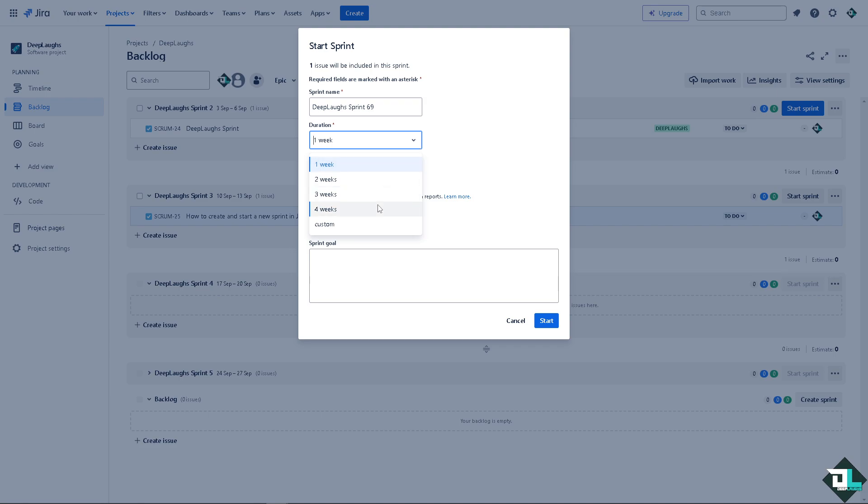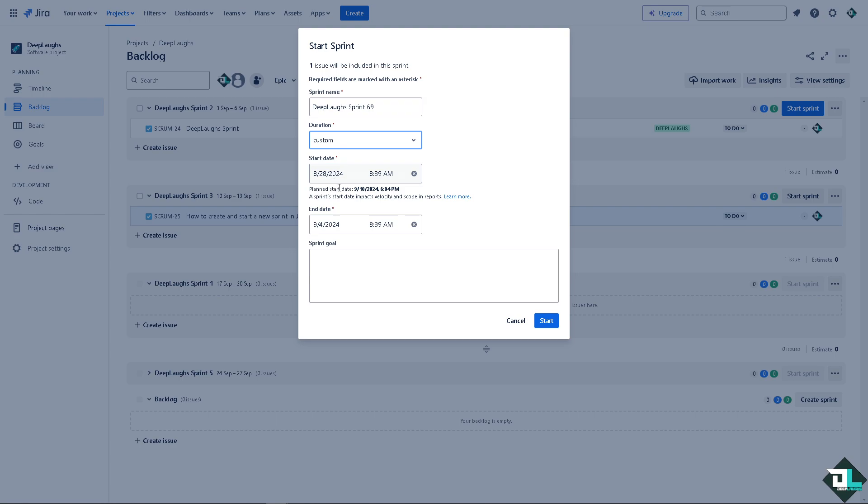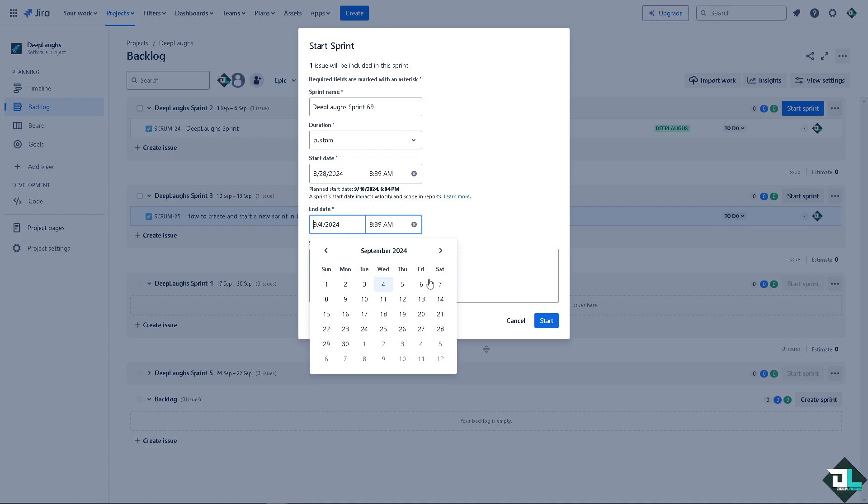Or two weeks, four weeks, or three weeks, you can put the custom. And the custom, you can set a start date which is going to be like maybe August 28th, 2024 and ends on, I don't know, maybe like September 30th, maybe?